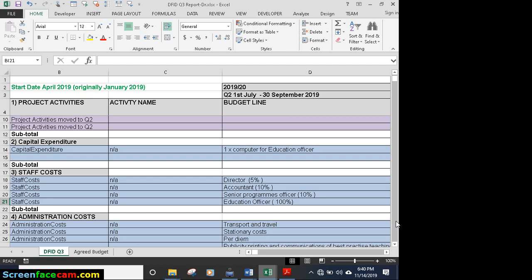No. It's 5% of his salary. So he has an agreed salary that he gets. So 5% of his salary is going to be paid by this project. The other 95% is being covered by different other projects. So it's based on the salary, not on the project.